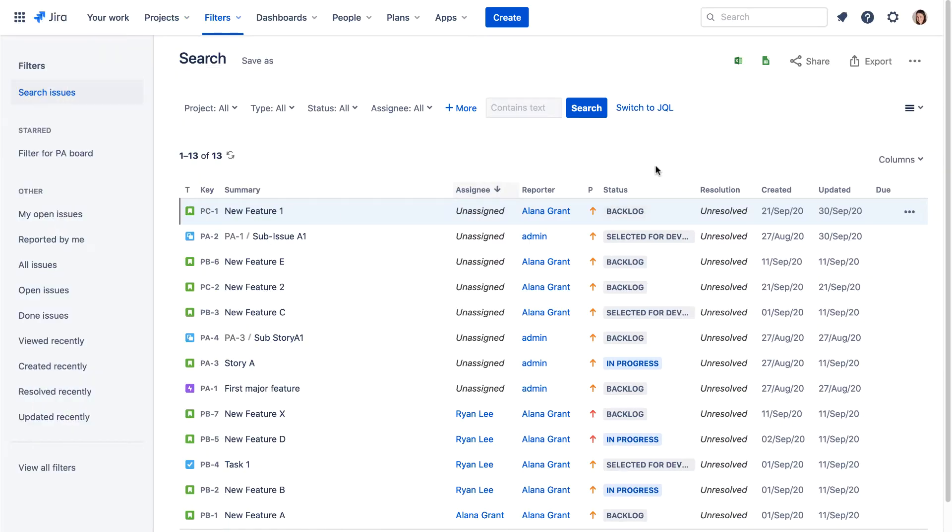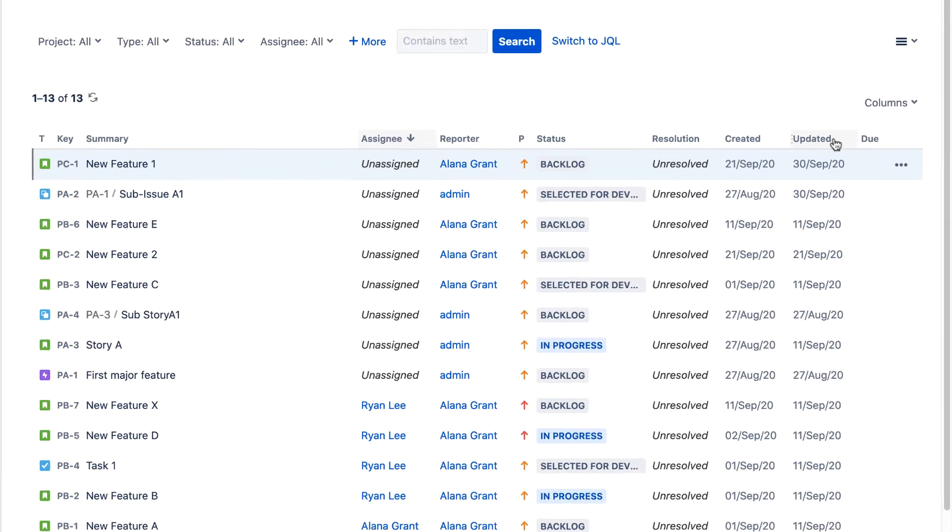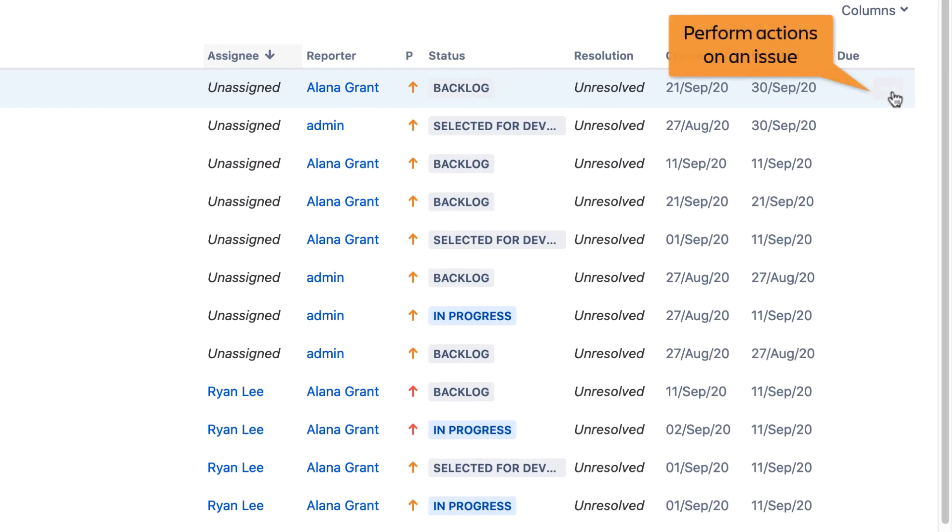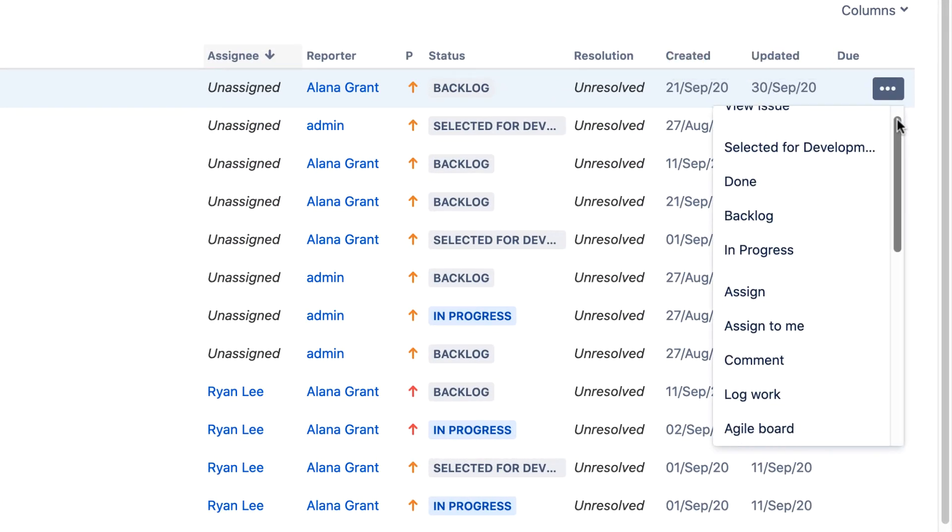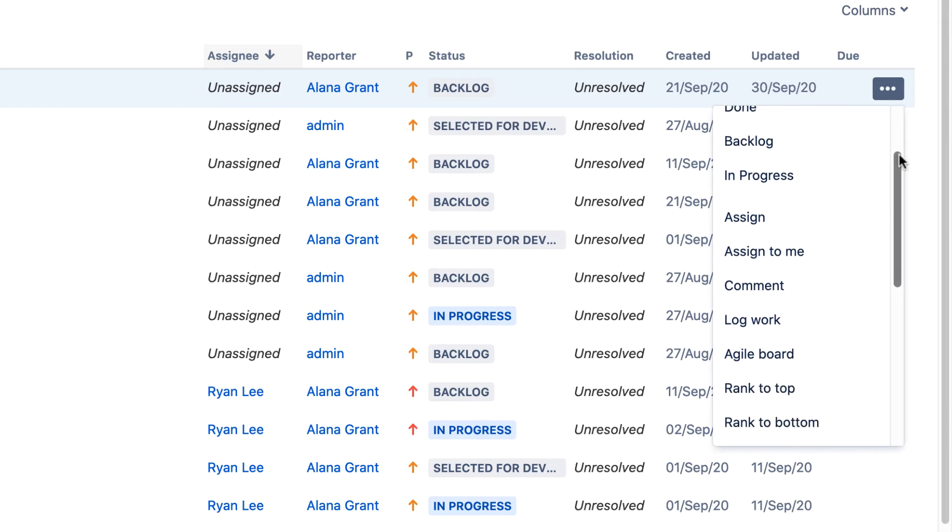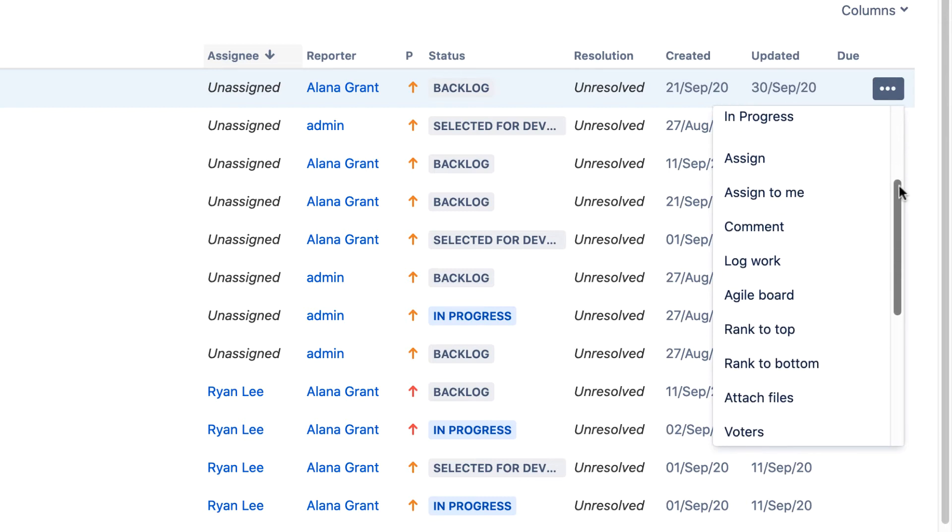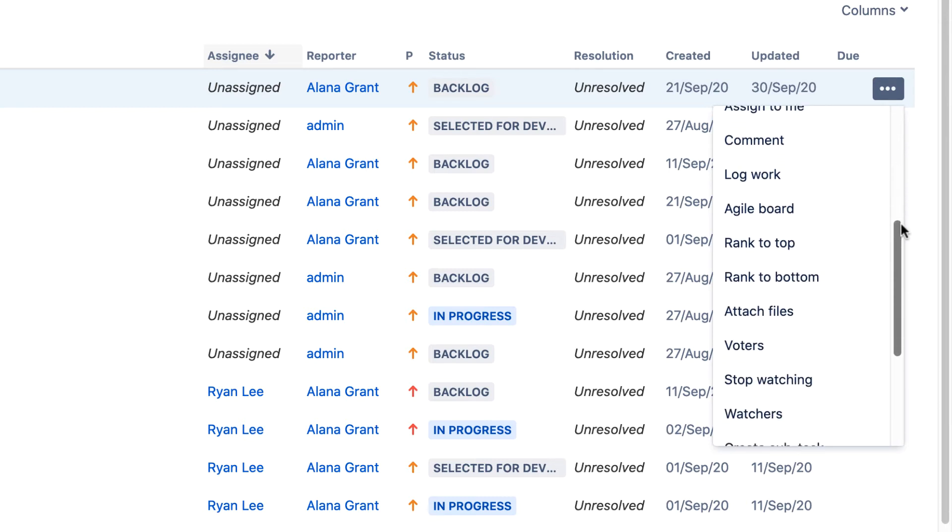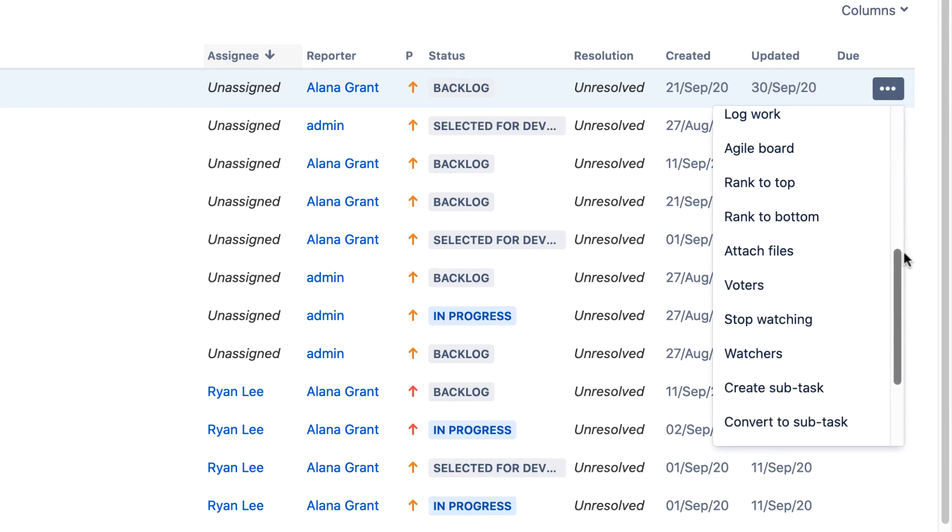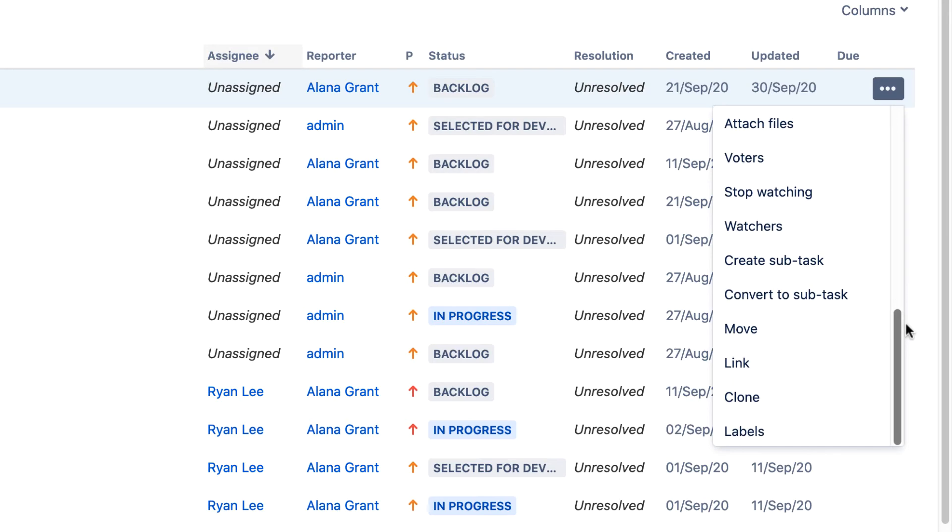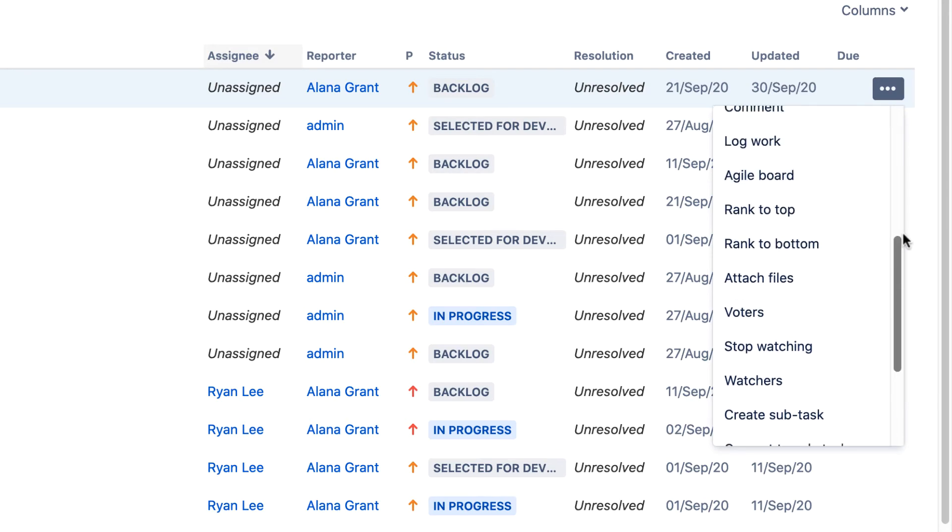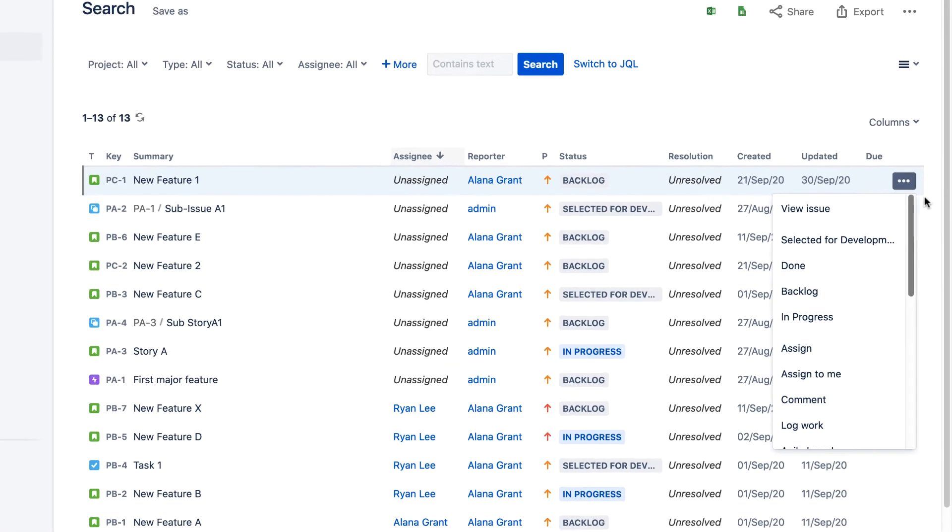A convenient feature in Jira Cloud is the ability to perform common actions directly on issues in the search result list. Just click the three dots beside an issue and select the action you want to perform. You can change the issue's status, designate an assignee, add a comment, log work against the issue, attach files, and much more.